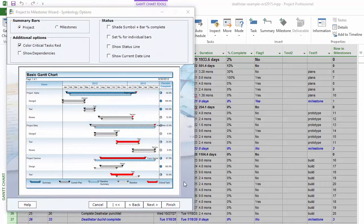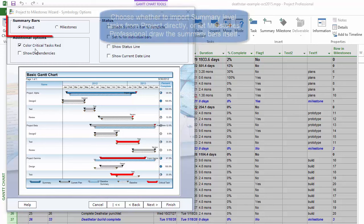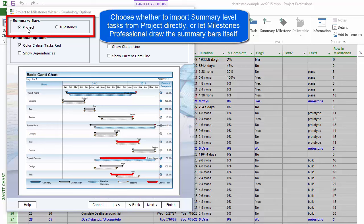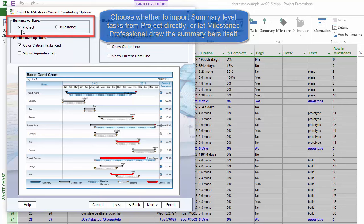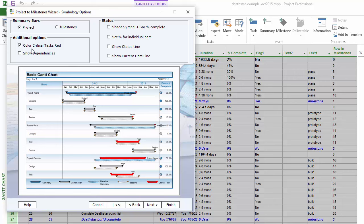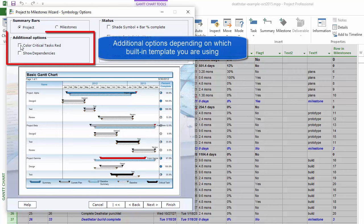For this particular template you have a lot of different options. For summary bars, you're either telling Milestones to bring in the summary bars from Project, or saying you want Milestones to draw them automatically. I'll choose to bring in the Project summary bars. You also have additional options like Color Critical Tasks Red or Show Dependencies, and you can see how those options affect the schedule in the preview — Show Dependencies adds vertical links, and Color Critical Tasks Red is also visible.